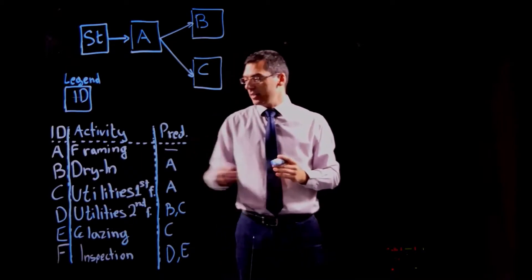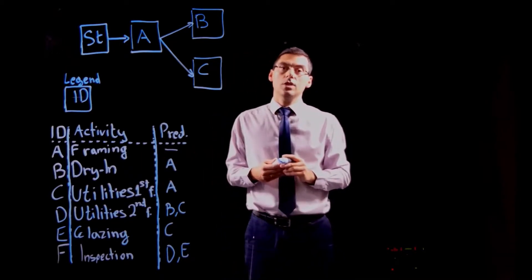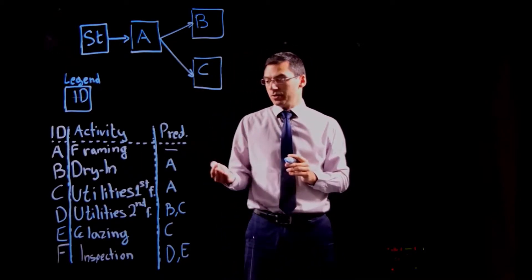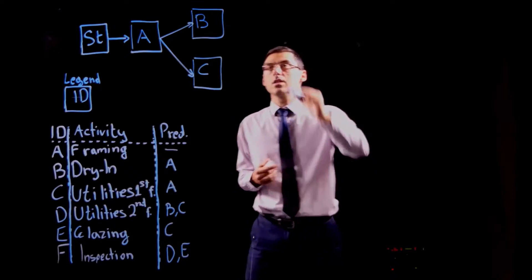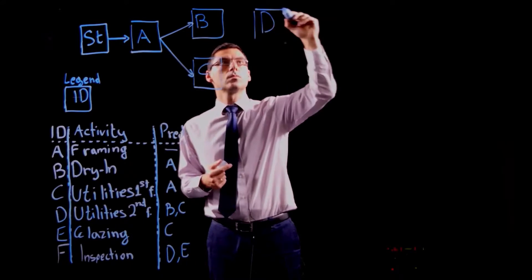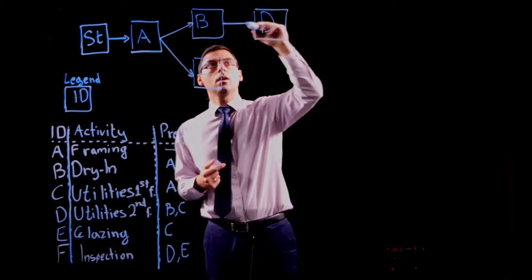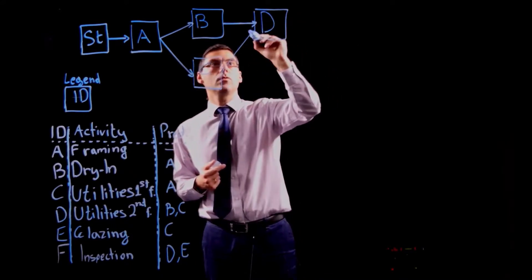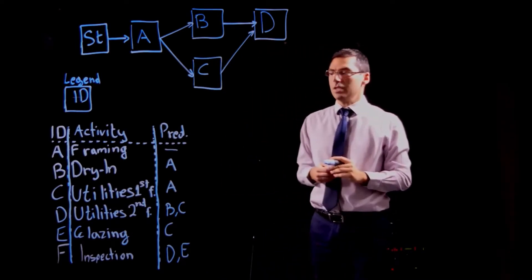The next one is activity D and as you see activity D comes after activities B and C. So I can place activity D here and I have two links that come from activity B and activity C.